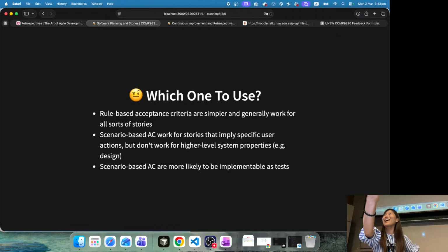We can split that. Yes, that's what I thought as well. So you mentioned add task and delete task, so they are actually different things. So you can split that into 2 different stories, because they are bringing different values for the customer. Although both of them are about managing the task, they manage the task in a different way and bring different values.